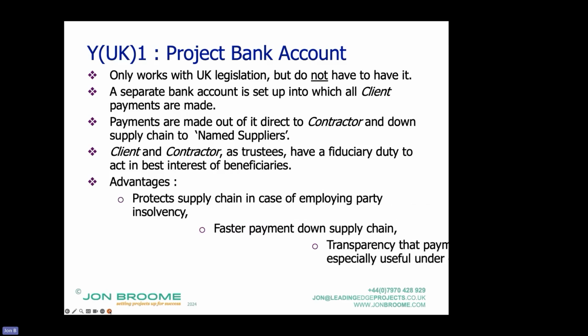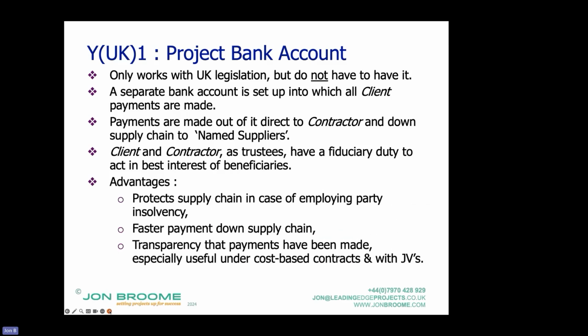Well, it protects the supply chain in case of insolvency of the employing party. So let's be topical. On the ISG contracts where this was in place, the money would be in the project bank account. It would go to the supply chain, the tier 2s and the tier 3s, rather than going to ISG and then the bank says we're closing you down and the bank gets it. So it protects money down the supply chain.